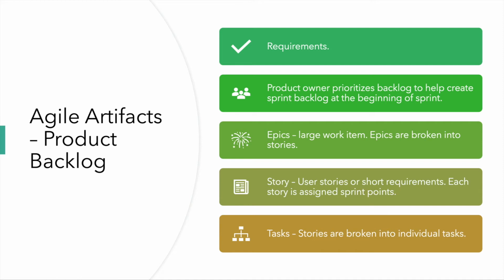And this story can be further broken into individual tasks. For example, user registration could be a story. For user registration, you would need a home screen. That could be a task, and then you will need a certain form to be filled for registration, and you need a submit button, and it has to interact with the backend. So all these will be the various tasks involved in a particular story.